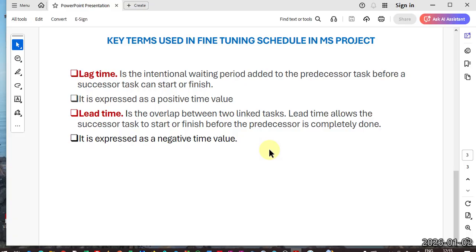Normally, there is a time given for review and approval. So, certain time is added after completion of the design for the review and approval to get done. After that, the actual execution can start on the ground.